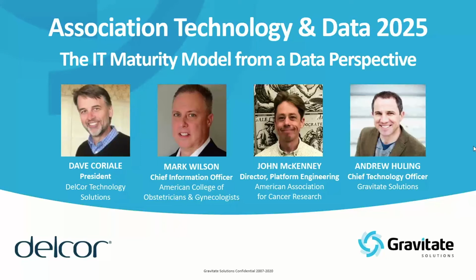Yeah, the hardest challenge, and I know we've highlighted this multiple times, is to be clear about ownership. And ownership doesn't mean one single thing. You've heard of the RACI chart: responsible, accountable, consulted, informed. So we had a version of that because, in Mark's position of having both departments, I think they can bake the entire process in naturally from the beginning. But for us, we had to be really careful because the experts are in the membership department. They are the experts in the membership, and we are the experts in this new system, because this is a brand new system.